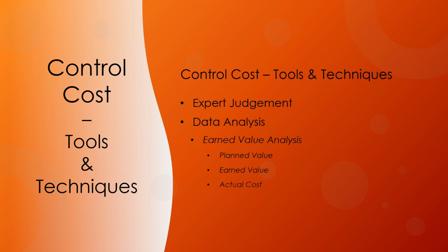Actual cost, or AC, is the realized cost incurred for the work performed on an activity during a specific time period. It is the total cost incurred in accomplishing the work that the EV measured. The AC needs to correspond in definition to what was budgeted in the PV and measured in the EV. For example, direct hours only, direct costs only, or all costs including indirect costs. The actual cost, or AC, will have no upper limit. Whatever is spent to achieve the EV will be measured.